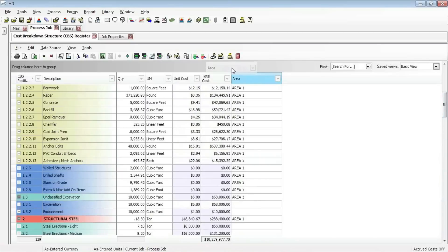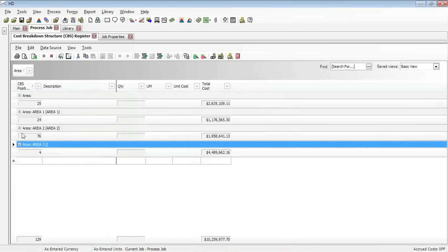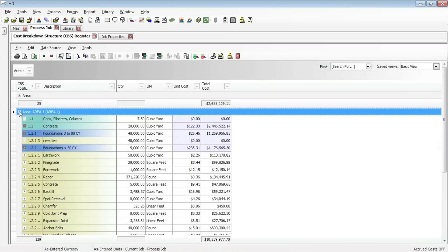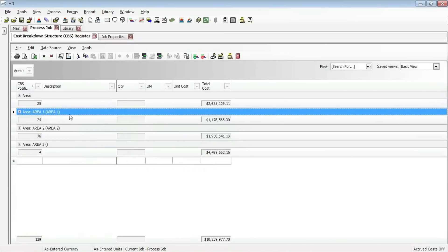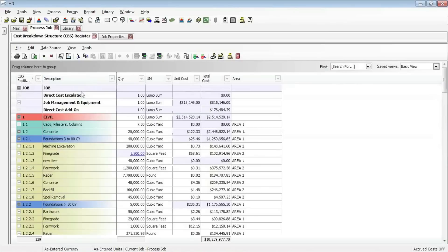You can see I can pull this area column up into its own area, and now I have my project organized into those 3 different areas. I can expand and collapse them, and it subtotals the cost, man hours, for each of those areas. It allows me to look at my estimate in different ways or my budget and group it however I'd like. Whenever I want to clear that grouping, I can do so.